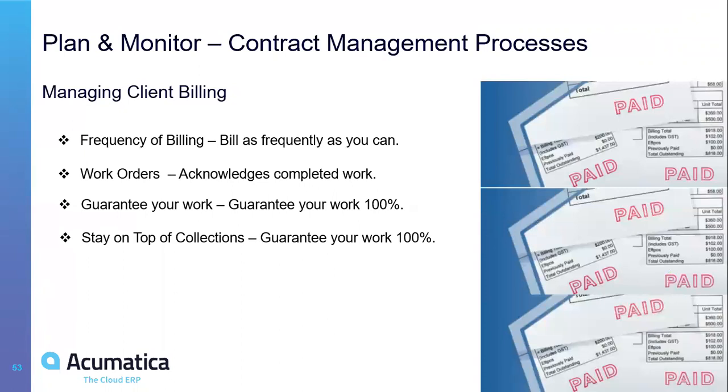In time and material projects, maybe I issue monthly invoices on the hours that I work together with my team. Again, it's your job as a project manager to control this, to track this, and then every month go back to your finance team and say, these are the amount of hours that we can invoice back to the end customer now. So part of your responsibility as a project manager and part of your monitoring during the whole project is as well to make sure to send the invoices out.